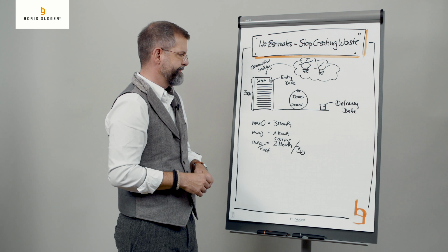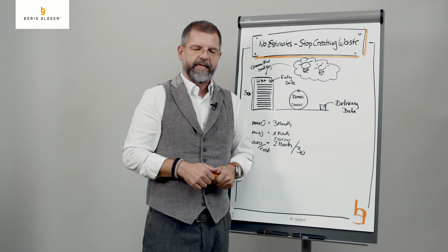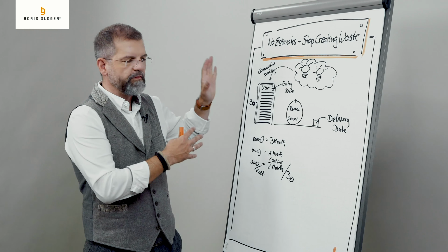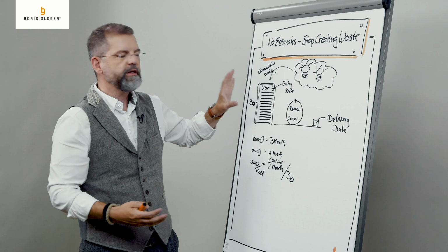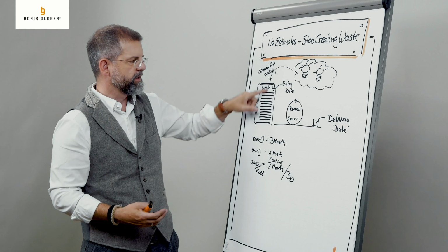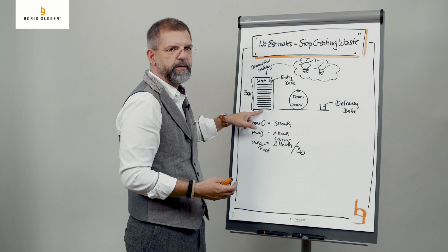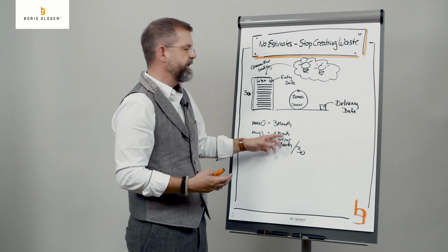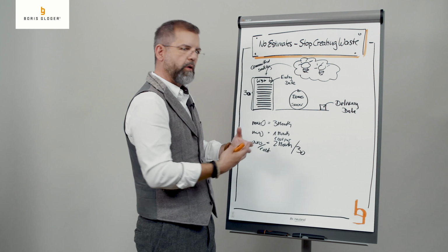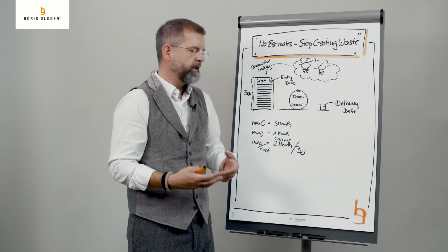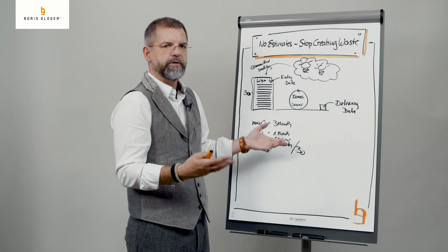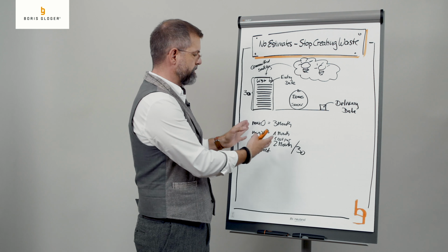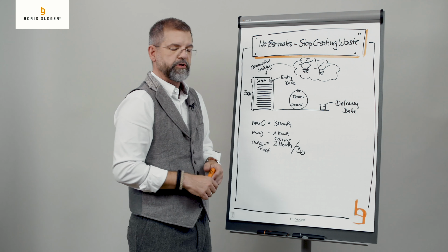And if I know that, then you don't need to estimate at all anymore, because we did that over time, again and again, and we did not even have an idea how large or difficult or complex all these items were. But we know on average we delivered at a specific rate. Sometimes we had a more complicated or harder to develop feature that took maybe 3 months or a year, but on average it's still 2 months, because we observed that it was on average 2 months.